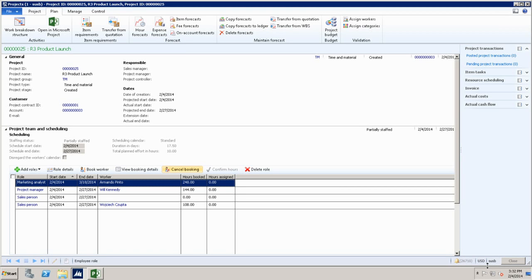So then you have two options: either continue in Microsoft Project and publish back, or unlink if you don't want Microsoft Project anymore. It is a very flexible model in a way, in that you choose which surface area, and if you don't want Microsoft Project, you just unlink it. And then you can basically go from there. What comes to Microsoft Project are activities, start dates, end dates, project categories, and resources. The key stuff that will be synchronized between those two are the entities that we talked about.